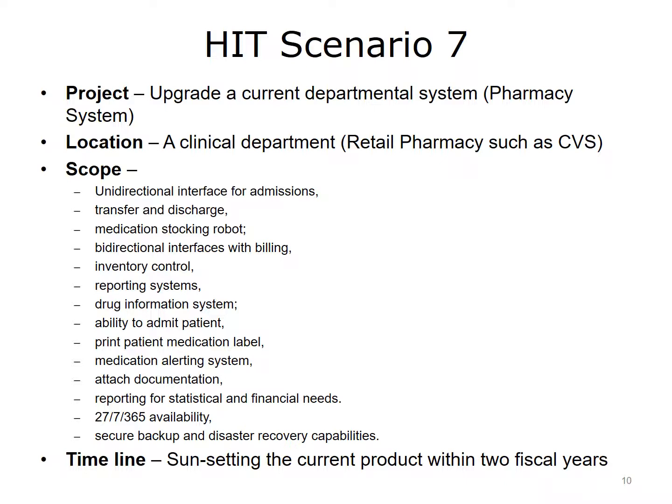So in addition to yourself, administrative staff, and experts on the current and the incoming systems, your team should include some regional managers from these rural areas so that you can get their input on specific challenges associated with their particular regions. On top of all this, the system user's interface will need to be very simple, as well as the transmission interface between the various offices. You will be facilitating the training of hundreds, perhaps thousands of people in pharmacies across the country, with training materials provided by a third party, your vendor.